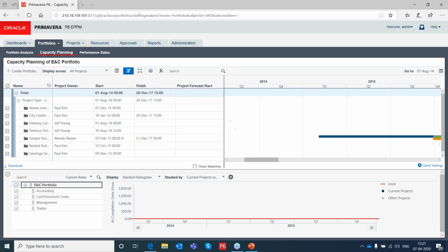Each area is under one responsible person. He has resources assigned, and he has to get the work executed within that area using those resources. That can be achieved in Primavera using your activity codes, and then you can have responsible people assigned. Then they can monitor it accordingly. Okay, and also after monitoring, we can update it in the program as well, to see where we currently are. Correct. You can do that. Yes. Okay. Thank you so much.